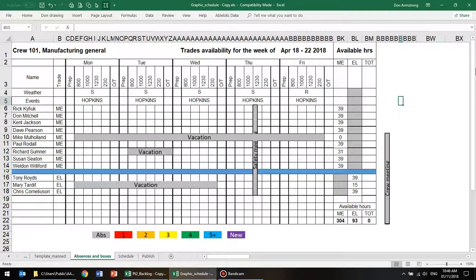Now, the planned estimate, which is what shows in the estimate column on our backlog, should be based on the time it would take an experienced tradesperson. And if the scheduler knows that the person he's assigning it to hasn't done the job before, he should adjust the estimate to reflect that. You might assign 2 people to a job instead of 1 just for training opportunities and so on. And of course, if the supervisor thinks that the estimate is just wrong, which it could well be, then it should be corrected.